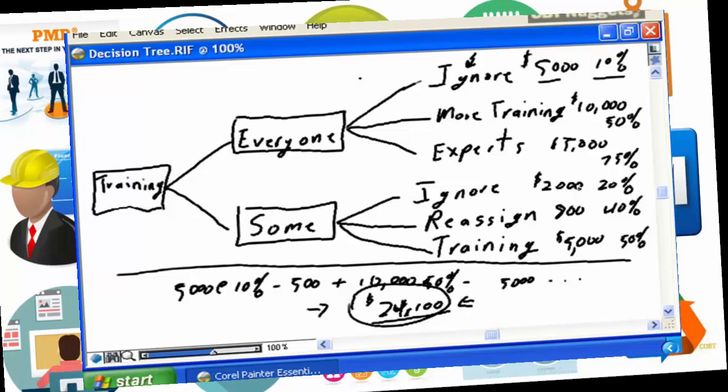Is the largest value, saying worst case scenario, if I have to take a single action, I will bring in experts, so perhaps $15,000 is the right number? Is it the average of all of your numbers? So if you take each one of these individual actions and average them together and come up with an average or a weighted average. The problem with risk management is there is no right answer.